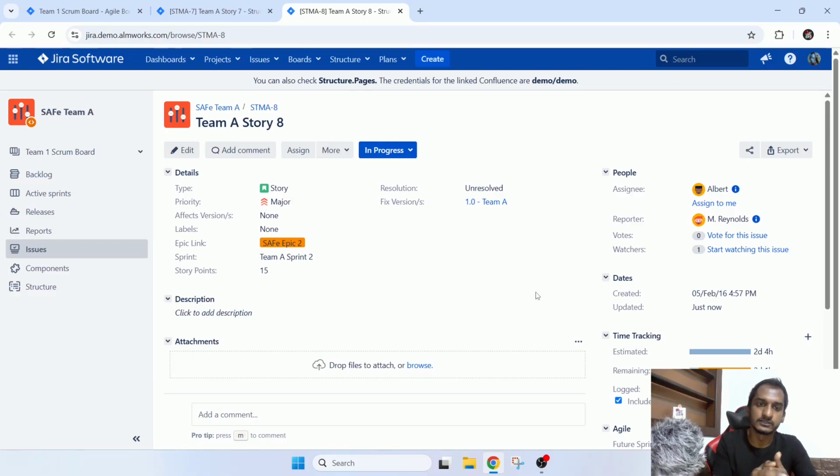come to a conclusion. Let's say again there are, as I mentioned, 6 people, 4 developers and 2 quality engineers. Let's say 4 out of 6 gave 5. Then that is more than 50% of votes. So in that case we can go with the 5. Likewise, you can decide the story points.